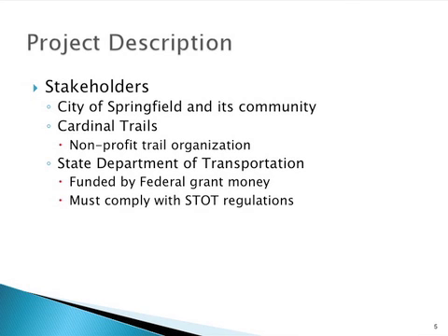The City of Springfield and its community is the first stakeholder. The City of Springfield is the client of the project, and its community are the primary potential users of the trail. The second stakeholder is a nonprofit organization called Cardinal Trails. They are partnering with the city in this endeavor and will have input in the design and implementation of the trail. Cardinal Trails will be treated as a client, but the official client is the city.